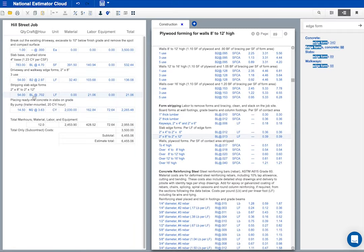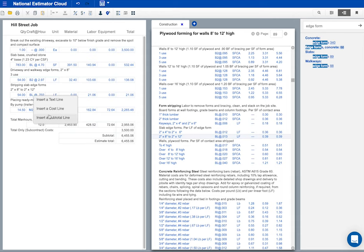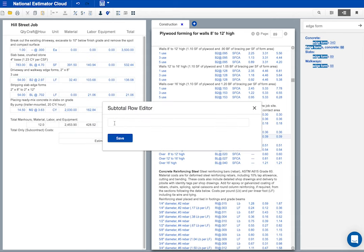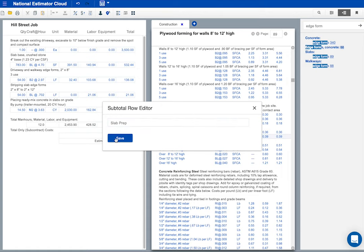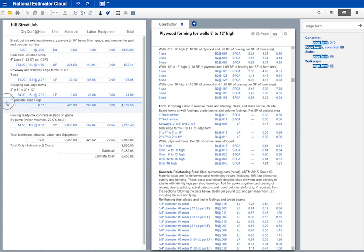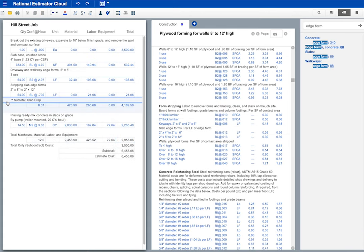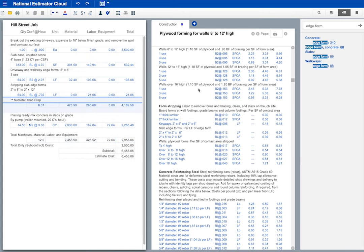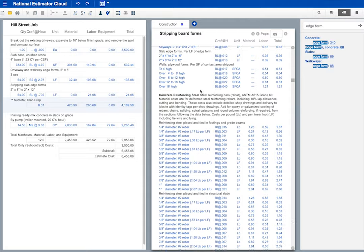I'm going to click here and right click to put a subtotal in the estimate. Subtotals make estimates easier to check and understand, but that's not all. When this estimate is done, I'm going to turn it into a bid. When we get the job, I'll convert this estimate into an invoice. Estimates have to show every cost. Bids and invoices don't. It's enough to list charges by job phase. That's why I give each job phase a subtotal in my estimate. I'll show how this works a little later. Okay, we've got a subtotal in the Hill Street estimate.